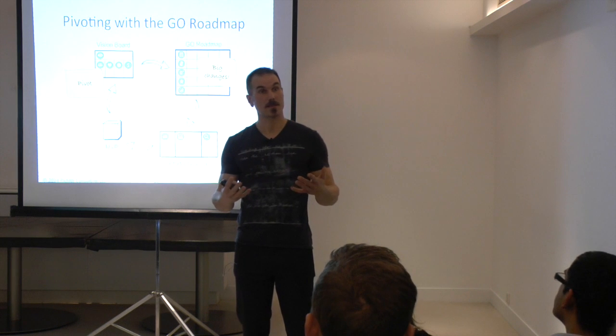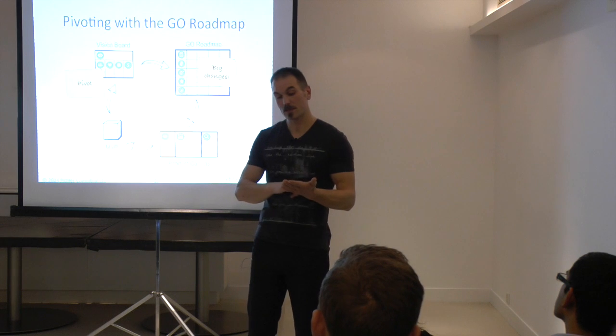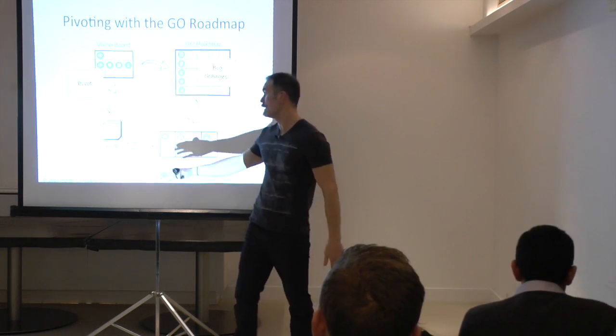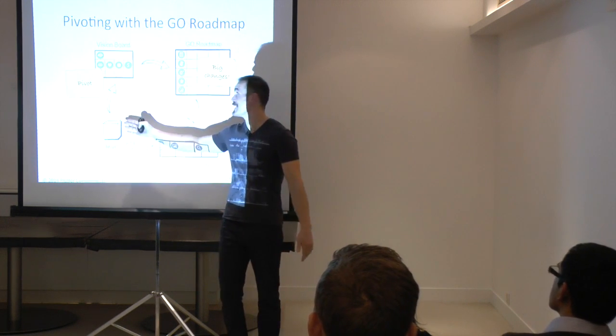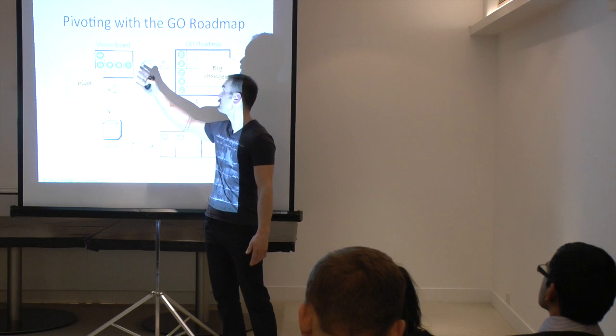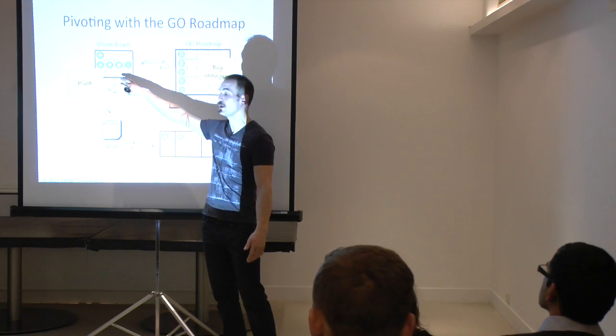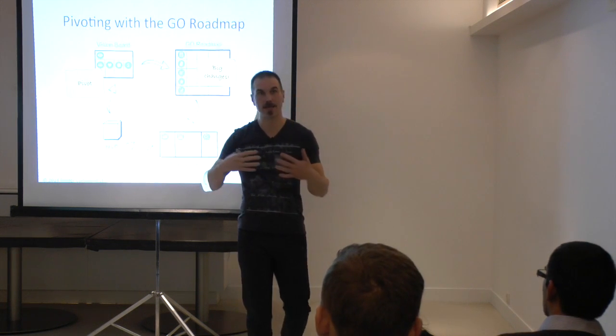That's an unexpected adjustment, and it's a major adjustment. Otherwise, what I would suggest is that whenever you have an MVP, or something like an MVP, you check whether the strategy is still valid, and that means, if you work with a roadmap, are your business model canvas or vision board, or Lean Canvas, and your roadmap still valid?